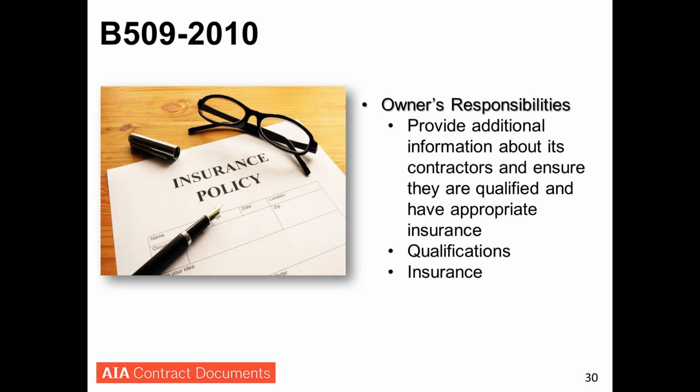Also, there are issues of insurance, specifically cutting corners on the general liability insurance, mold exclusions, and there actually are condominium exclusions and EFIS exclusions and all kinds of very specific riders that can be in policies that will cut out insurance that we would otherwise reasonably expect to have been included in the owner's and contractor's agreement.